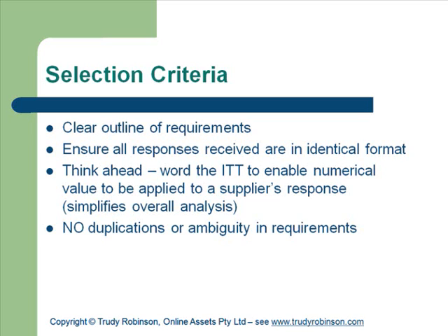Perhaps you should determine the length of detail you ask by the value of the contract. So if you've got a contract that's worth 50,000, you might be limited to 5 questions. If you've got a contract that's worth 5.5 million, well, fair cop, fill it in or you don't get it.